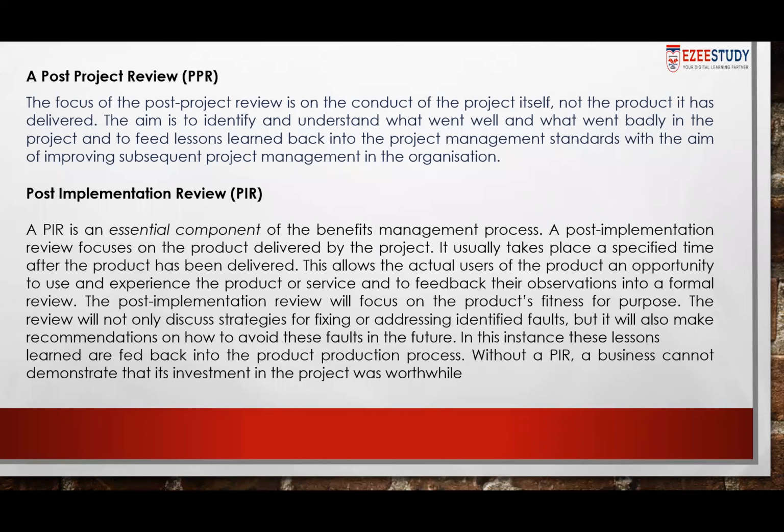But the post-implementation review is about the product itself, and it's the feedback that one is going to receive from the users or the beneficiaries of the project. For example, if you were implementing an ERP system in an organization, then once you have implemented it, you will be taking the feedback from the users and seeing what type of product you delivered. Did it meet the expectations? Did it meet the objectives? So that's called a post-implementation review.